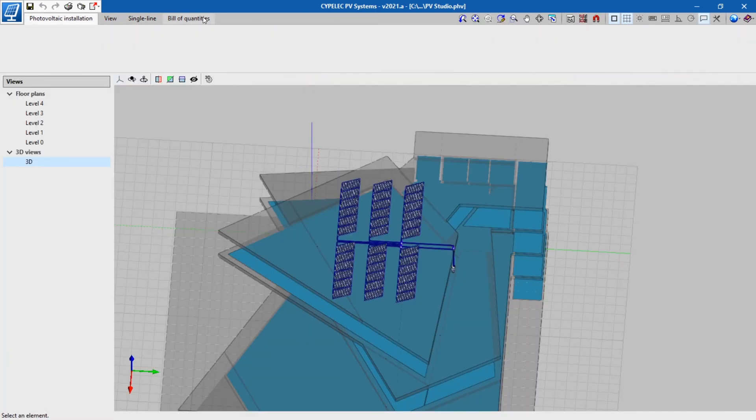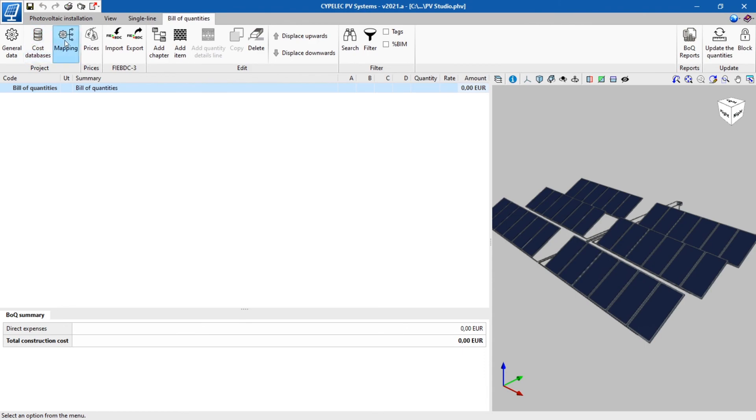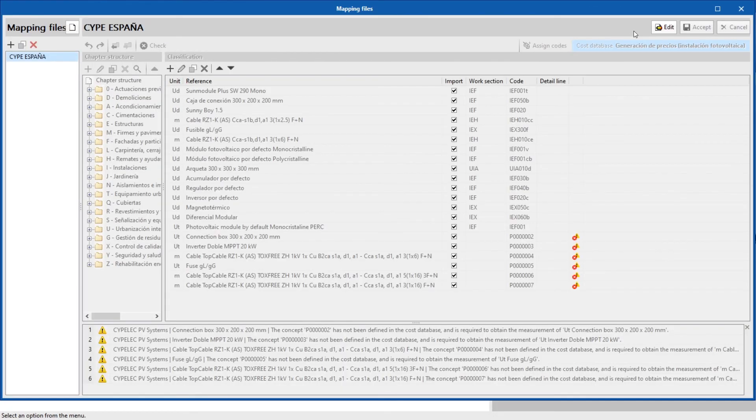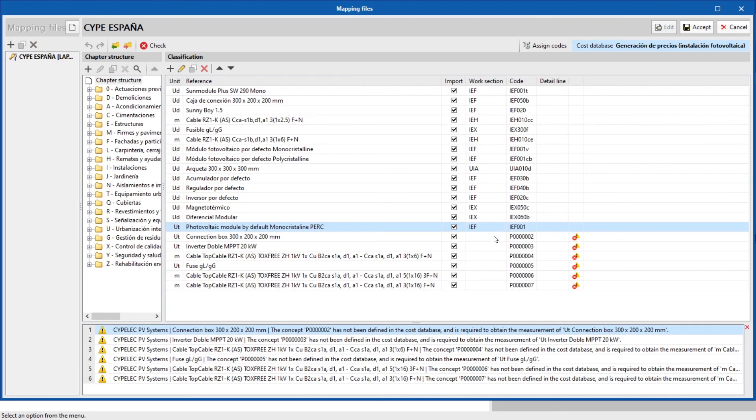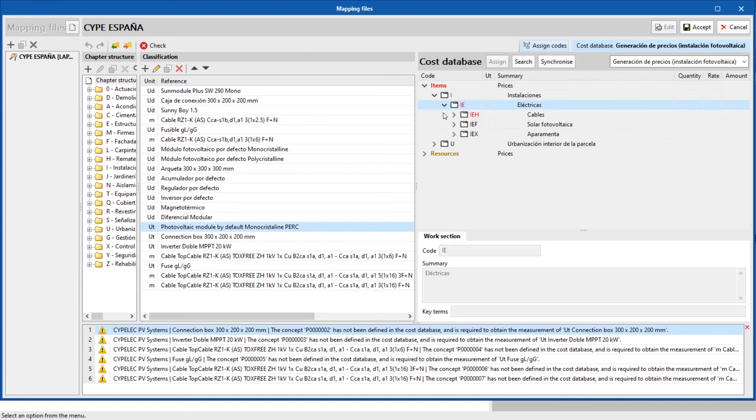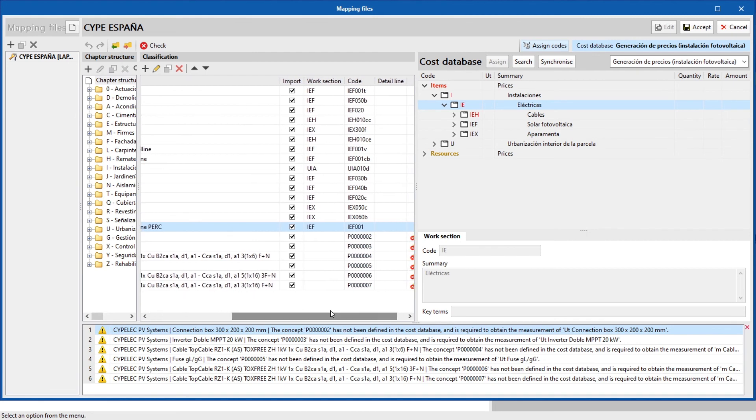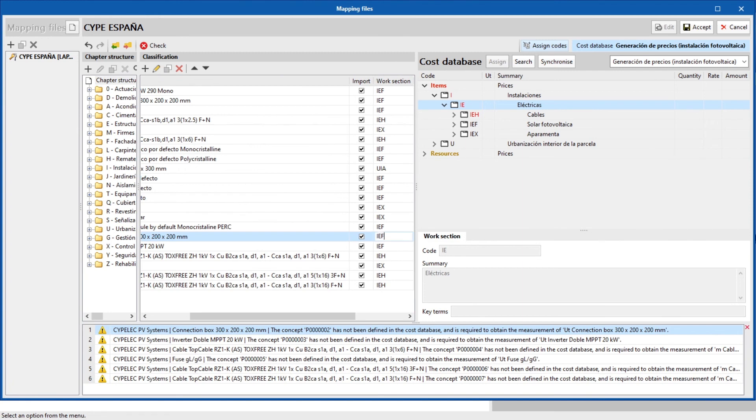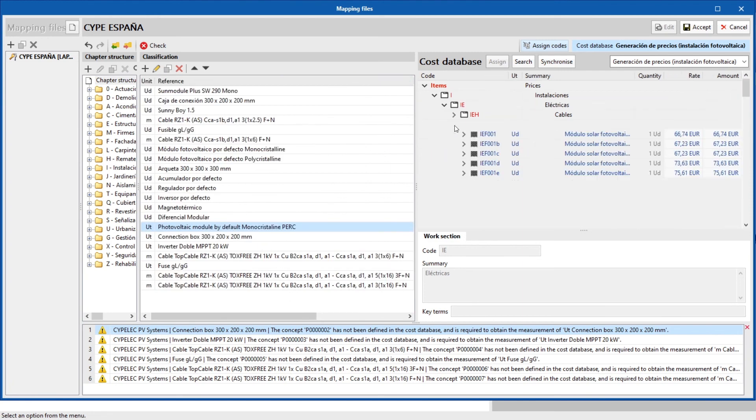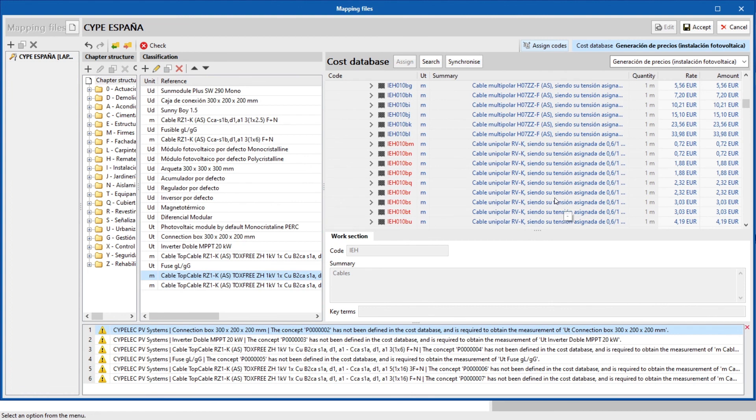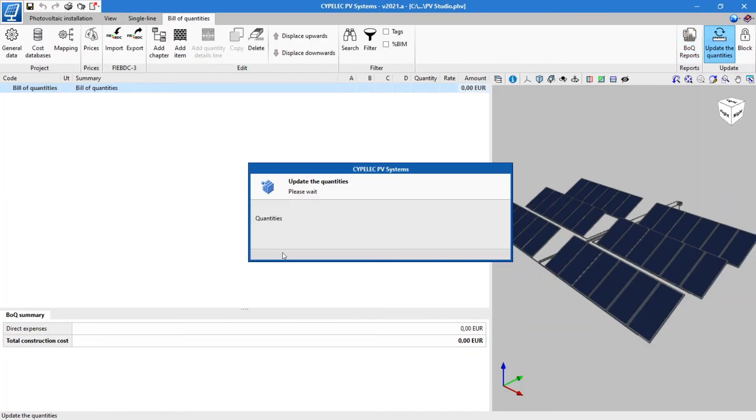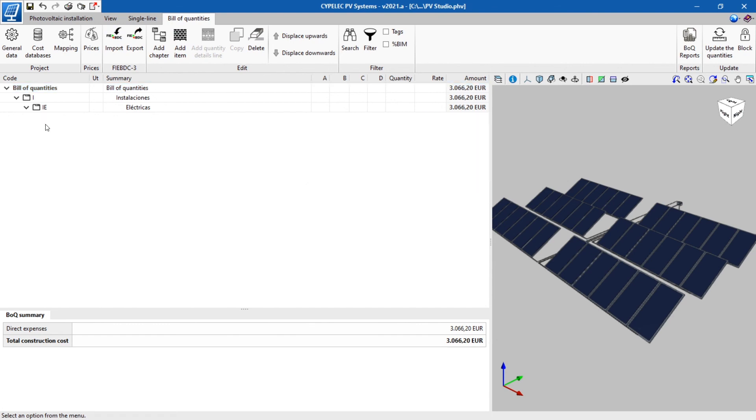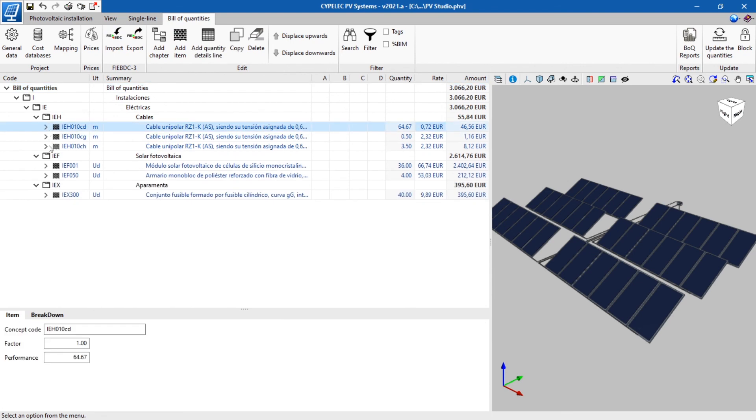Finally, the application provides the possibility of generating a bill of quantities of the installation. This requires defining the prices of the materials and assigning them to a category. This information is given by default for materials already loaded in the program. For those created by the user, the category will have to be defined and the price assigned from a cost database included or imported to the program. Once this step has been carried out, the reading of the installation will be updated, first generating the bill of quantities with its respective items.